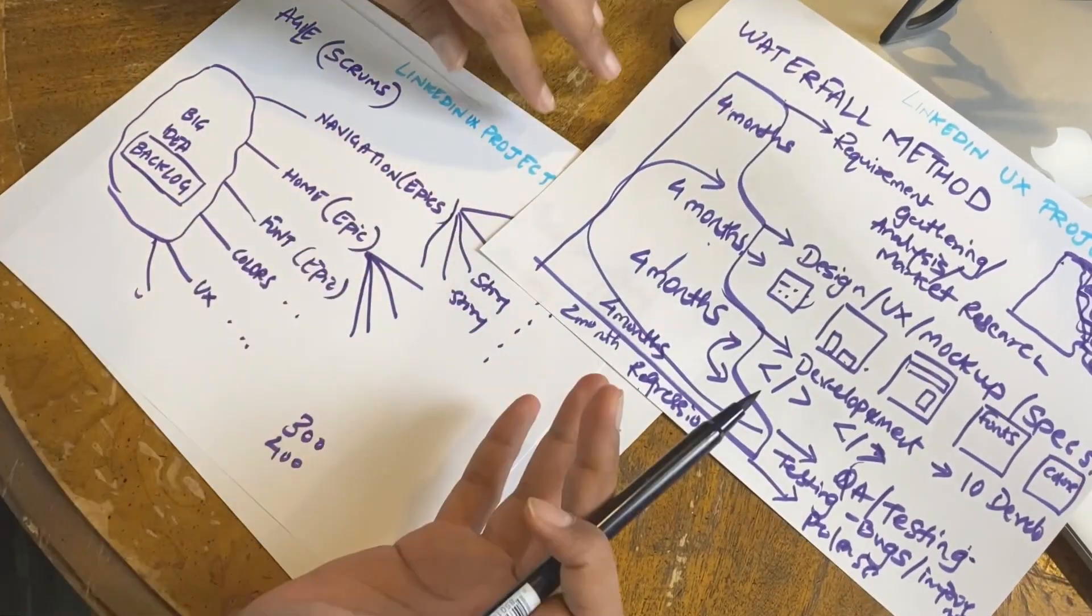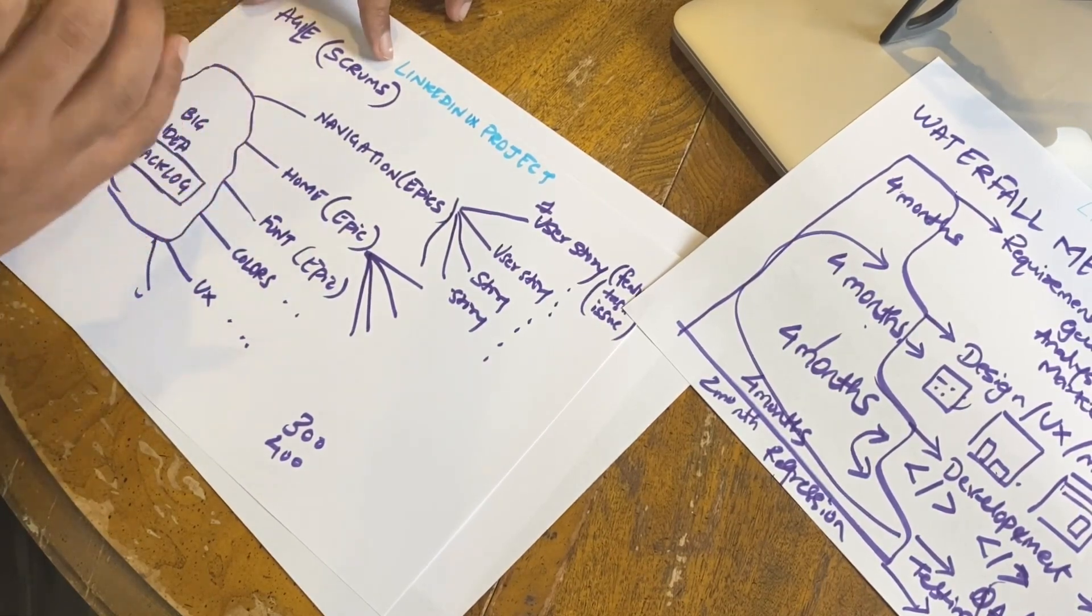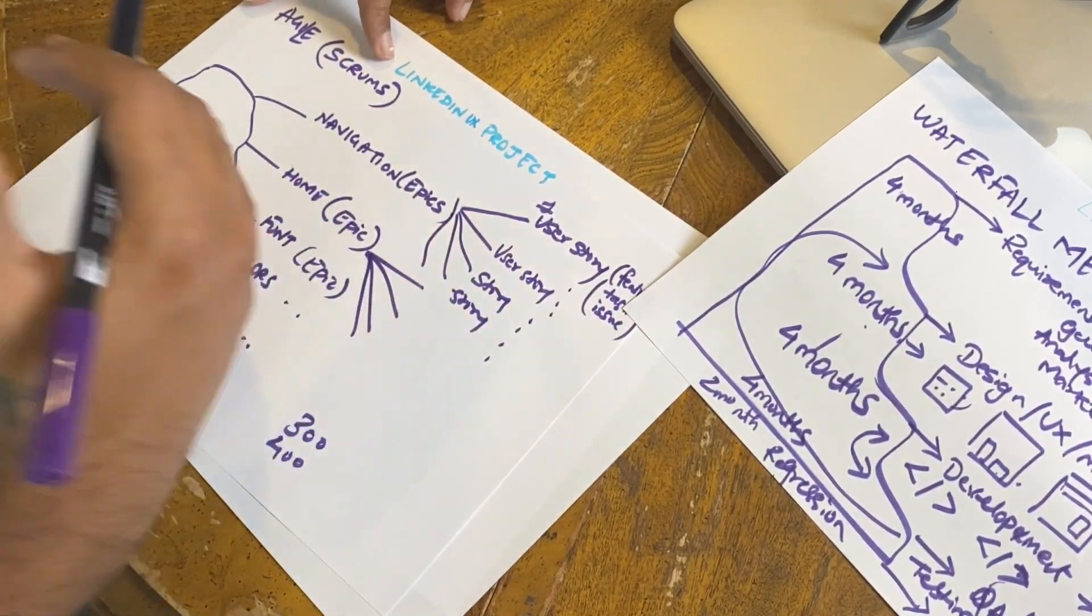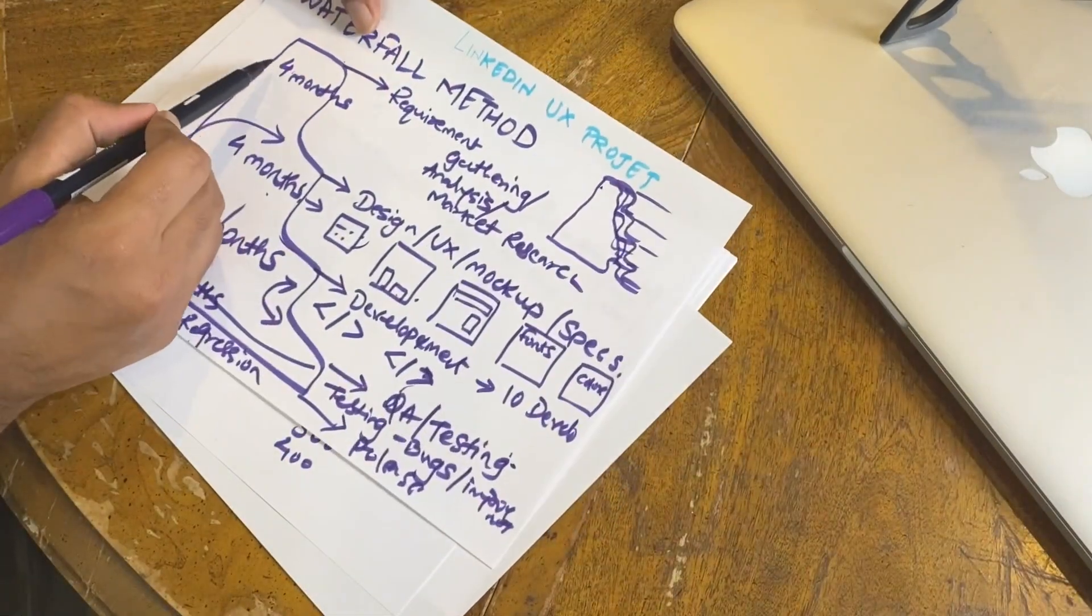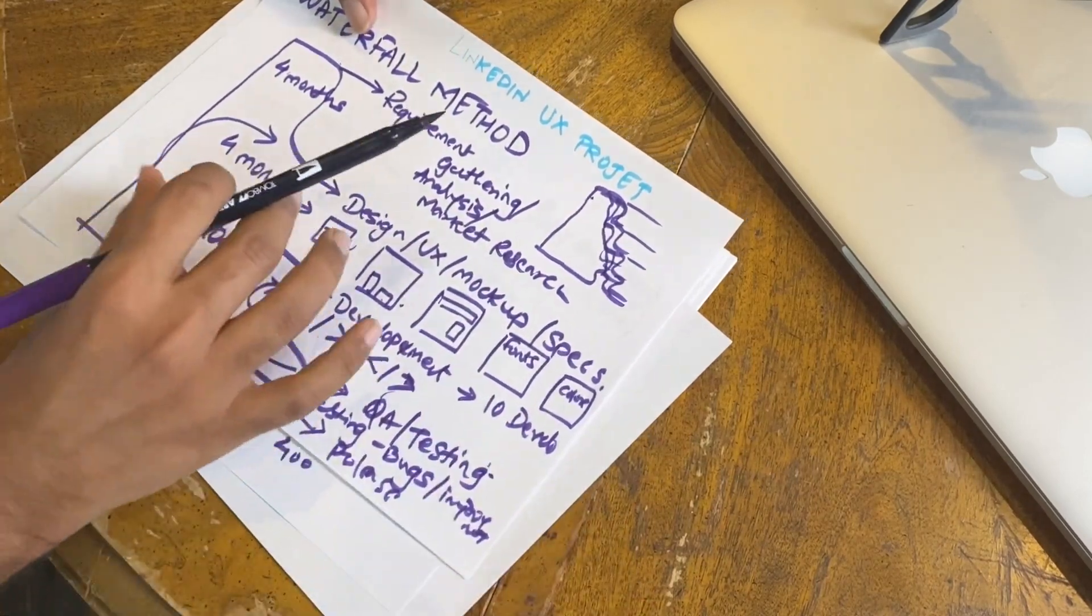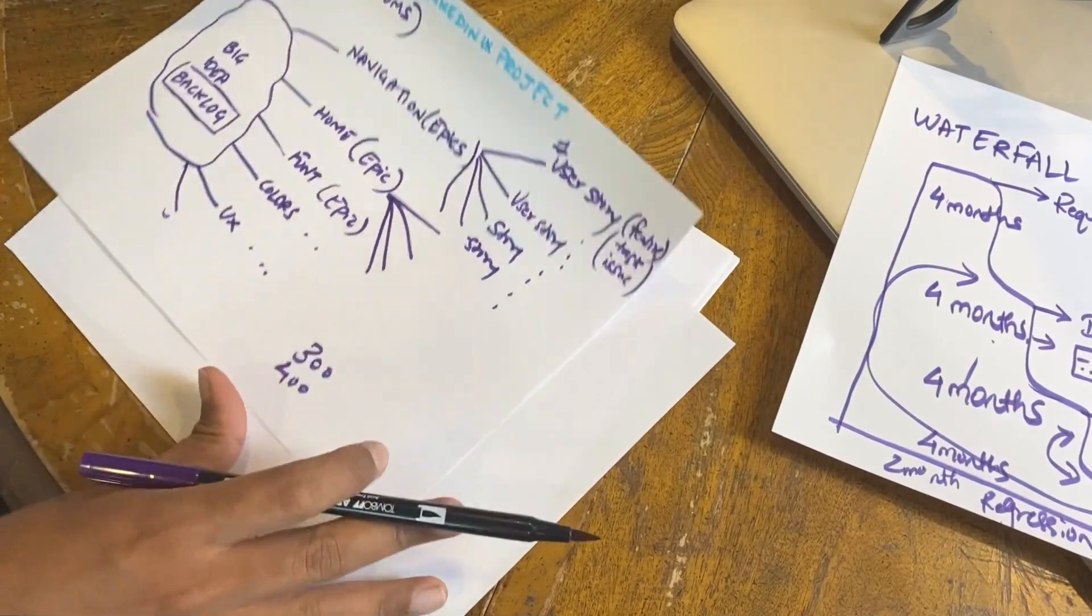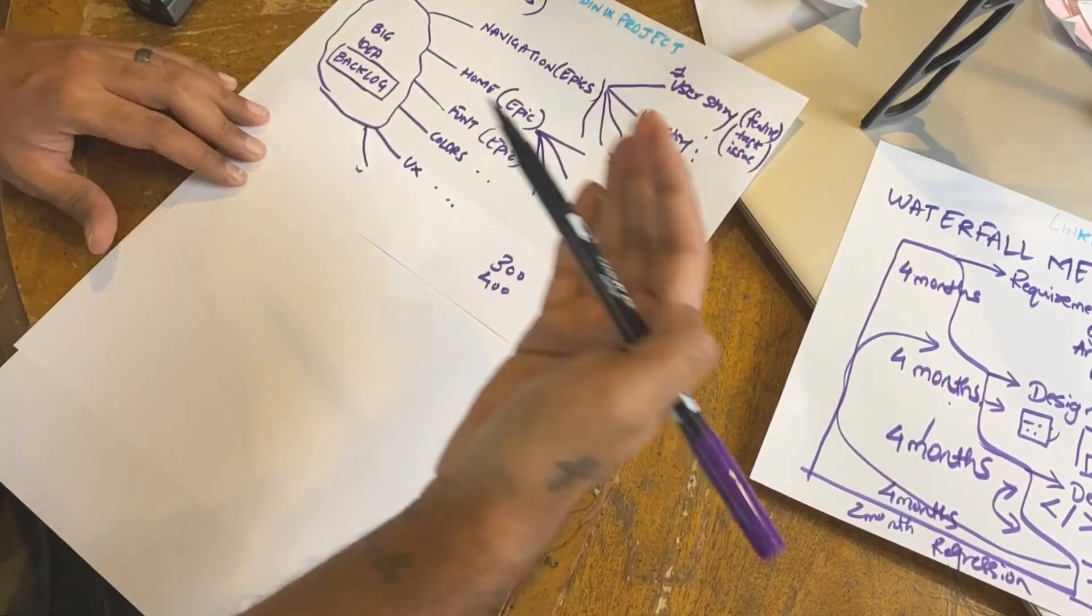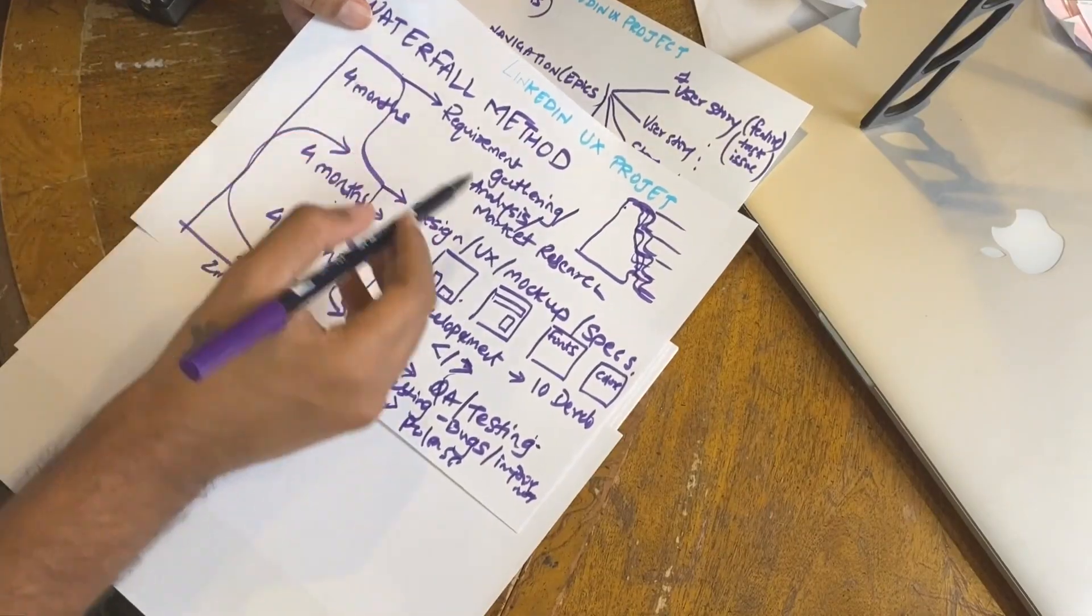To start the project, they start the project as soon as they feel like okay, we have a list of things we want to implement. Let's start breaking it down. They create epics and user stories and the work starts. They don't wait four months for this phase to finish. Design is a little bit ahead so they do a little bit of design but not completely. We come up with the minimal epics and user stories for developers to start. They don't wait for four months. Now the project is started.